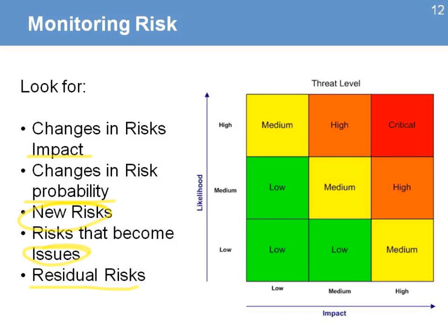The concept behind changes is that we might have a risk that initially was here, having a medium probability and a low impact, but as we start moving in the project and we get more information, we see that the risk now is at this new level. So the strategies that we had at the beginning will not work anymore. And if you try to use those, they might even have a negative effect.